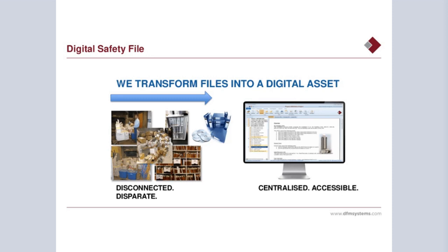By providing a full audit trail, including the original design intent within the safety file, it can be clearly demonstrated what changes were made, who decided to make the change, what was the purpose of the change, and why the original design was changed for whatever reason.